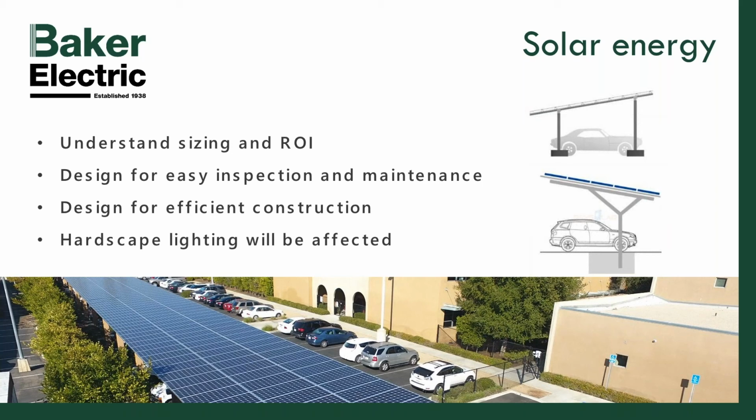And then understanding that when you put in solar carports, there are other things that it impacts. It overflows into ADA compliance, okay? So if you put solar in, there are ADA requirements for equal access, meaning you have to cover some ADA spots. So just like with the EV charging stations that Mark might talk about here, we may have to restripe, repaint, and adjust the path of travel, do those types of things, if we can't locate the most cost-effective solar arrays over those ADA compliant spots. And then lastly, lighting.